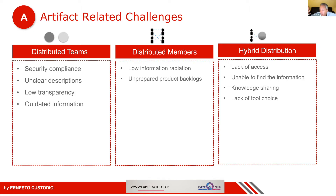Program planning — it's PI planning for those familiar with SAFe. It's about what are we going to achieve over the next quarter. In the case of SAFe, let's look at our high-level objectives, decompose those, look at the dependencies, and agree on which teams are going to work on what and by when.